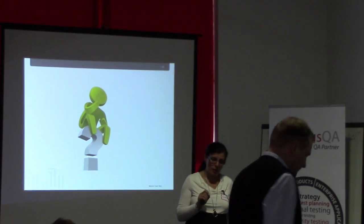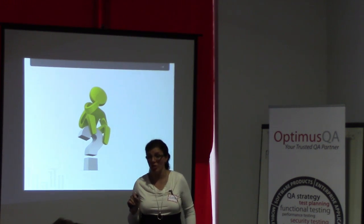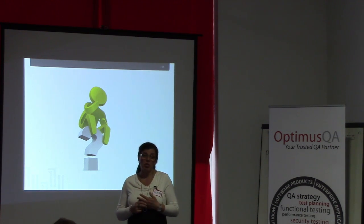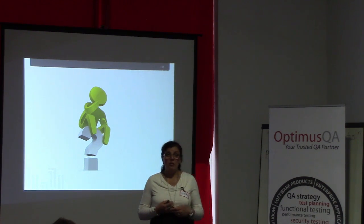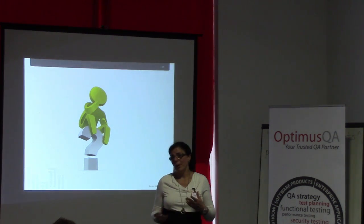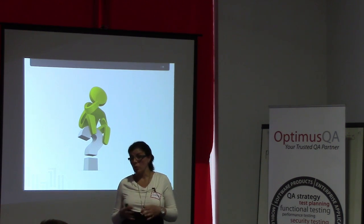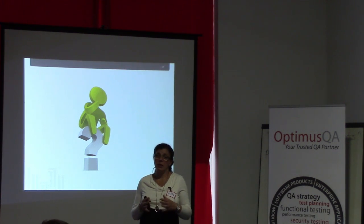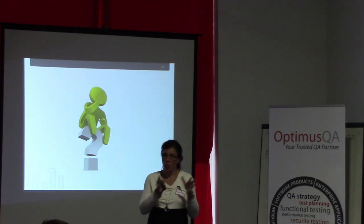In this time frame, we usually don't assign all 147 to a project, because your tester, or any other resource for that matter, will have other things to do. They will have some admin work. If they're full-time employees, they will have mid-year reviews and year-end reviews. They might have some goals that they need to accomplish, improving the processes, and so on. So we try to put it at about 110 to 120 hours for project work.